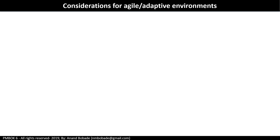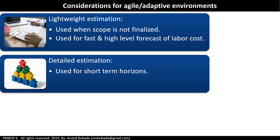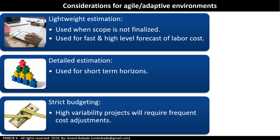Considerations for agile and adaptive environments: estimation in traditional versus adaptive projects is different. In agile projects, sprint duration and team are fixed — in other words, cost and duration are fixed and scope is adjusted. Key considerations include lightweight estimation, used when scope is not finalized and used for fast, high-level forecasting of labor cost; and detailed estimation, used when scope is clear and finalized, for short-term horizons. Strict budgeting is required for high-variability projects with constantly changing objectives and requirements, to ensure there is ROI for the project.